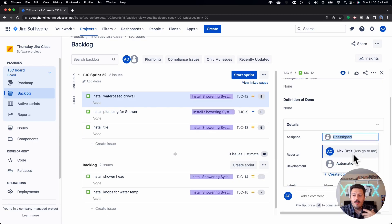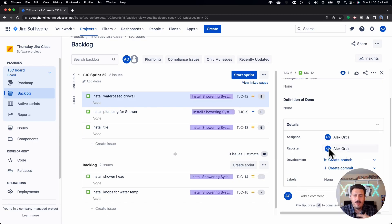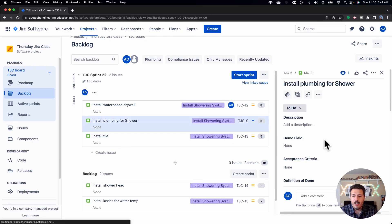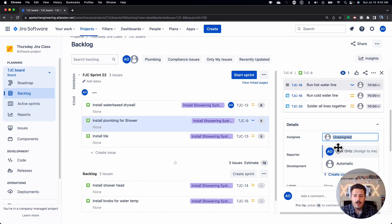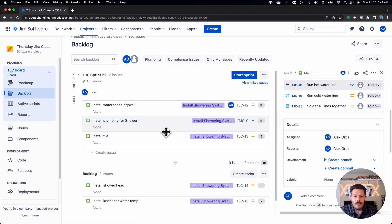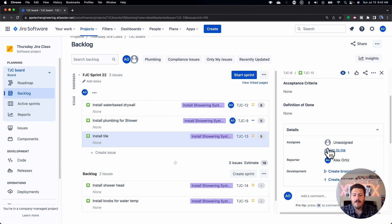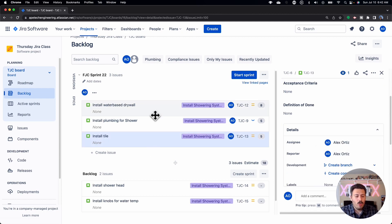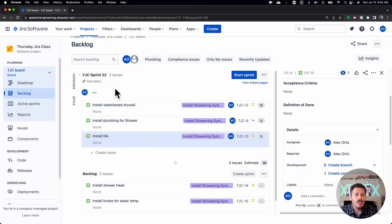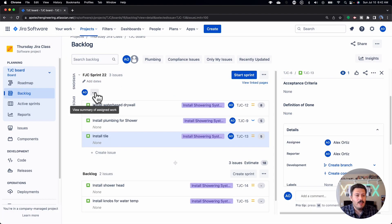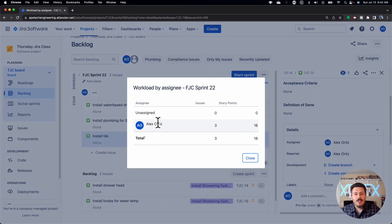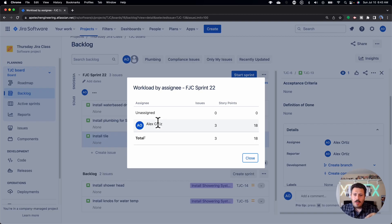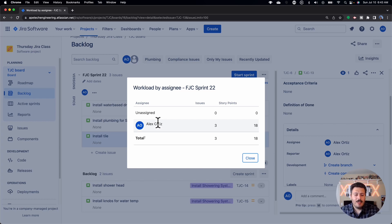I am doing the assignments. I only have myself here, so I'm just going to very quickly assign myself these stories. And so you can just assign them to the right individuals. And then as an added bonus, once you do this assignment, once you do this estimation, as a sanity check before you start your sprint, you can actually come over here. There's a view summary of assigned work. You can click on this, and it will show you every single person in your team how many issues are on their workload and then how many points are basically assigned to them for that specific sprint. And you can use this as a guidance, and you can also then compare it back to your previous capacities and your previous velocities to basically make sure that we're still kind of in the right place.